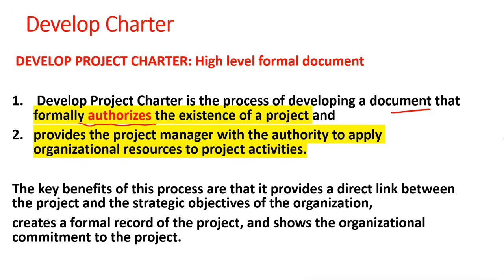So in A, B, C, D, what is the best option? You have to advise the sponsor that unless or until the project charter is authorized and formally signed, we cannot start the project. The charter provides the project manager with the authority to apply organizational resources to project activities. It means if the charter is approved, then the manager is able to use the physical resources and human resources of the organization in order to achieve the objective of the project.